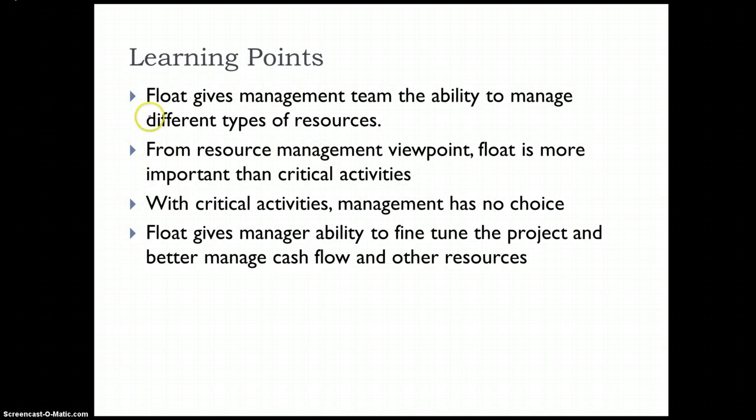So what we learned from this example is that float gives the management team the ability to manage different types of resources. From a resource management viewpoint, float is sometimes more important than the critical activities, because you cannot do anything with the critical activities, whereas the activities with float can be adjusted, and this gives you some room to play with. With critical activities, management has no choice. Float gives the manager the ability to fine-tune the project and better manage cash flow and other resources. Thank you very much, and I look forward to speaking to you again.